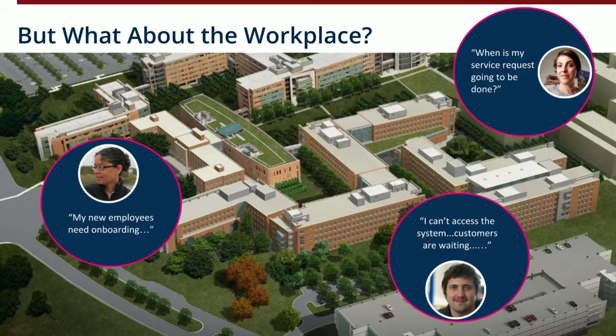You should in parallel also start doing gap analysis. This is where you will find out what you need to do to prepare your org for the migration. And you might also find out that you are probably not ready for the migration because there are a few critical business functionalities that are not available in Lightning. In that case, you might want to check out the Lightning Experience Roadmap, which is available in Help and Training, and plan your migration accordingly.